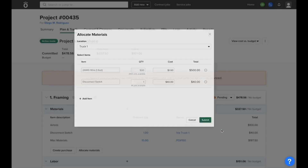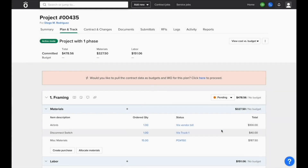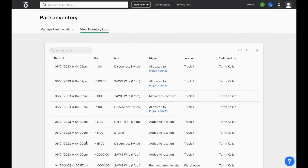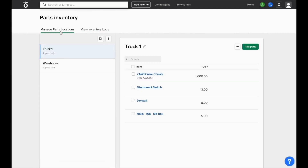Once this is submitted, it will reduce the items from inventory and increase the cost of the job. And just like with other actions, we'll be able to see this shown in our inventory logs to know where the materials went.